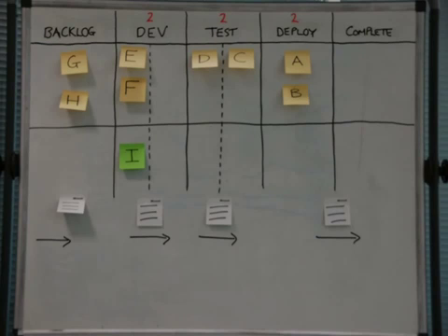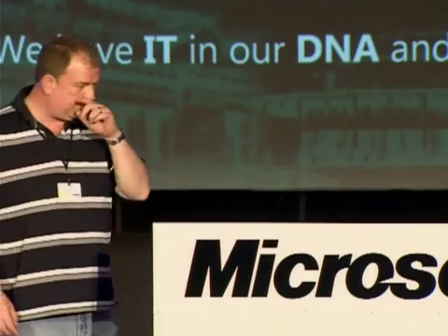Guess we're almost up. Hi. Do you put spikes in TFS? Yes, so the question was, do we put spikes into TFS? By that, you meaning like extreme programming architectural spikes, like investigative work? Absolutely. On that whiteboard one before, there was some work around performance profiling, the target environment. We were developing an application based on Silverlight Pivot Viewer, and it was going to be running with a lot of data, and we needed to do some spike work, absolutely. What you might want to do is have a different work item type called Spike rather than user story. It will go through a different workflow.